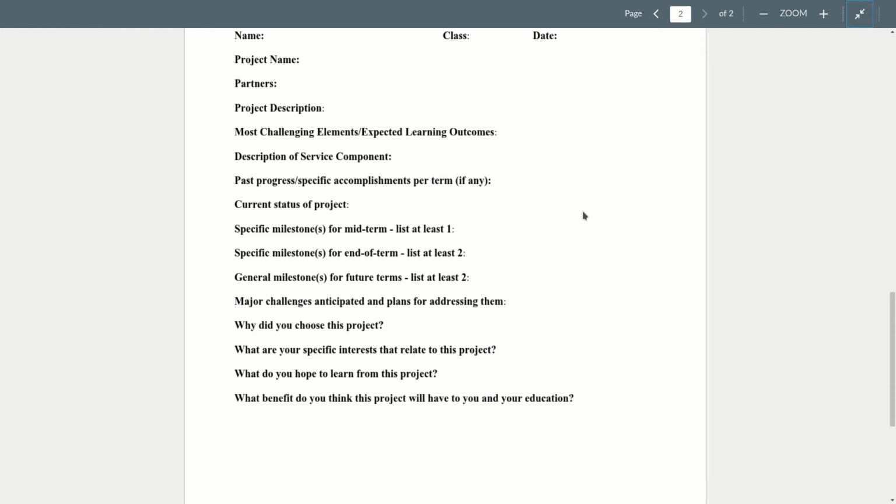So the idea of milestones is to set up some intermediate goals along the way. By the end of week 5, fall quarter, I want to have researched different kinds of heads-up displays and have found one that I can afford and that I think I can learn to use. That's a very concrete goal. It's very, very easy to state. And at the end of week 5, you can look at that and say, have I met this goal or not? Right? And if you have, you're on schedule.